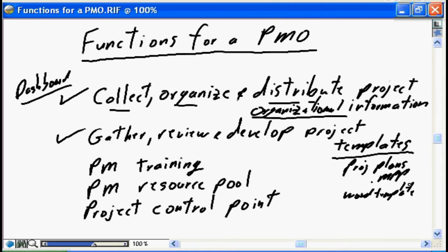so that if you need to deliver a requirement specification document, a system test plan, or any other document, you would go to the PMO, and the PMO would say, yes, our organization has done this before. Here's a template that has been reviewed, sanitized, improved, certified to be best practice for our company. And these templates are developed by the PMO, which consolidate the best practices across many projects, and for that matter, across many companies within the specific responsibilities that the template is being delivered for.